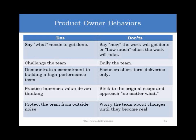The Product Owner has complete control over the product backlog — he grooms it, prioritizes it, and slices it into small pieces of work. He has the right to accept or reject the team's work. He gives requirements to the team, verifies the running product or final outcome, and has the right to accept or reject the work once the team has completed development.